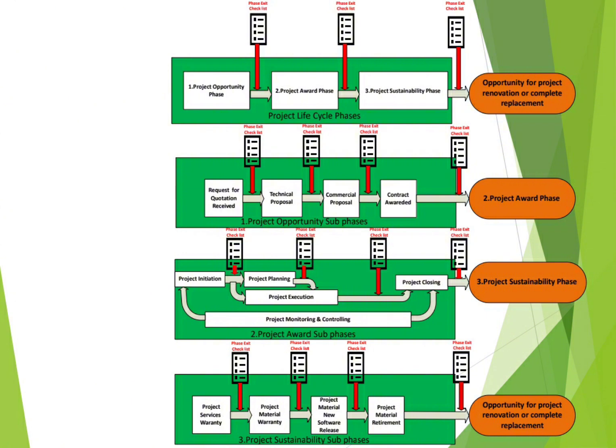So here for the planning, for the phase exit checklist from the planning, you need to have your baselines agreed and approved. So you will have the scope baseline, the list of activities that will be performed in this project, agreed with your customer. You will have the baseline project time schedule, agreed and approved also by your customer, and you will have the cost baseline also approved, showing how your budget will be distributed over the duration of this project, and the recognized revenue which will happen because of burning this cost.